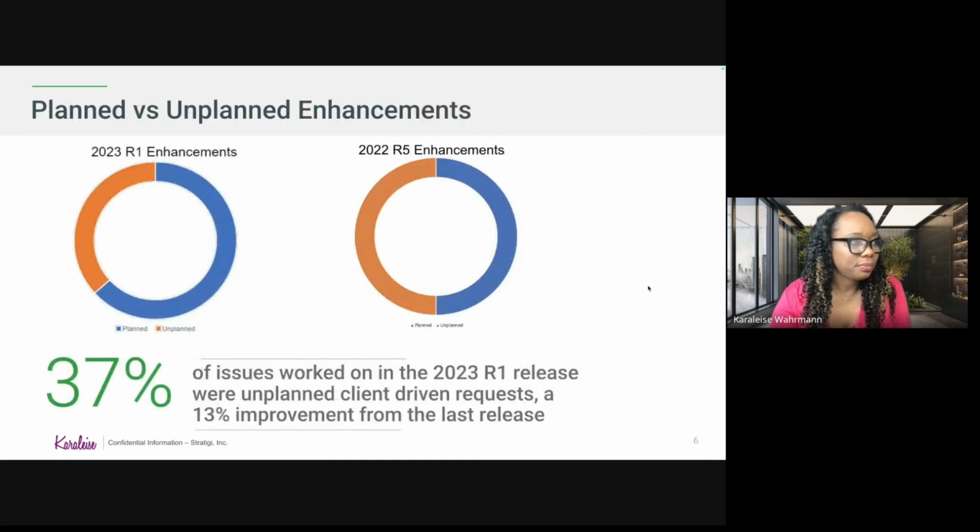And then how many of it was actually new development that we planned, that we had scheduled, and how many of it was stuff that came up as urgent, that we had to drop everything and focus on. We had that problem where in the middle of the sprint, people are just saying, oh, this is urgent. We've got to fix this right now. We have a bug issue. We have a production issue. And so we drop everything to work on that, and that caused us to be delayed.